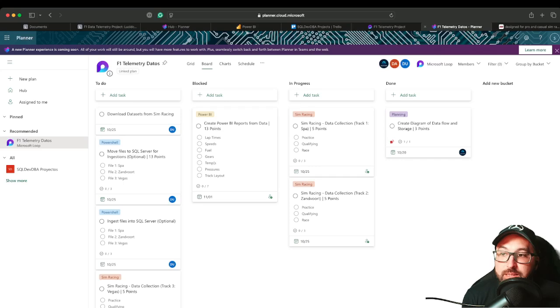Why? Because that's going to help me police this in the future. That's going to help me ensure that I can say with conviction, no, you know what? You cannot complete 30 points this sprint, because over the last 2 or 3 sprints, you've only been able to complete 15.